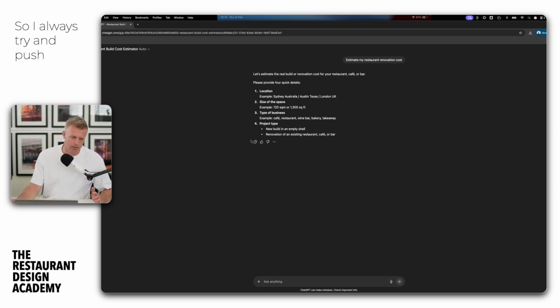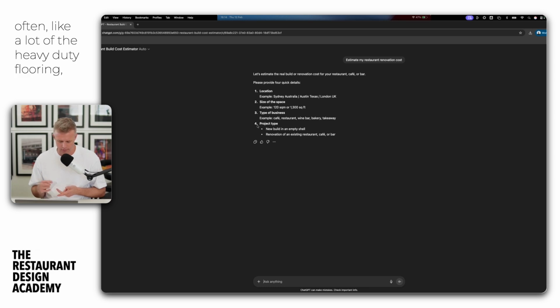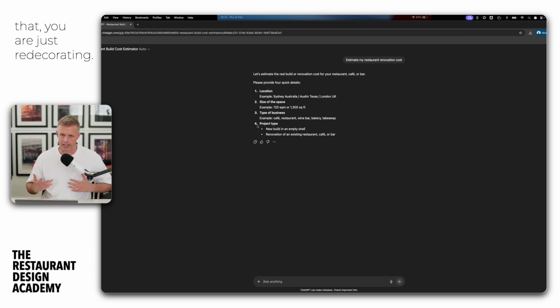So I always try and push people as much as possible to find existing restaurants, cafes, and bars to take over and refresh, because it costs you 75% less than building out a new one. You're not doing kitchen exhaust, fire protection, often a lot of the heavy duty flooring, the plumbing, the electrical, the grease traps, the restrooms, all of that. You're just redecorating. You're putting different things on the walls. You might change some floor finishes, the lighting, the front of counters or new counters. And you can do this for so much less money. It is by far and away the best way to do this.